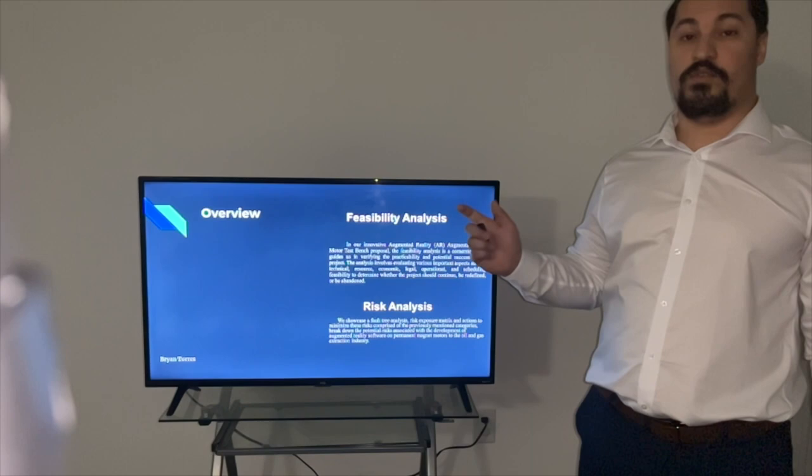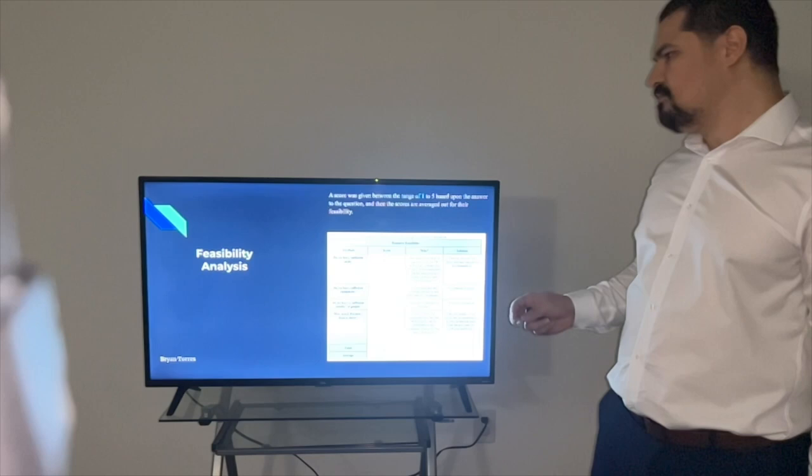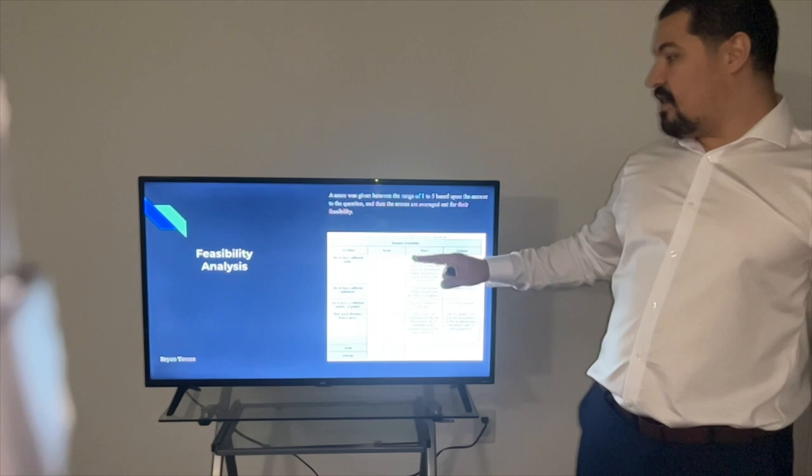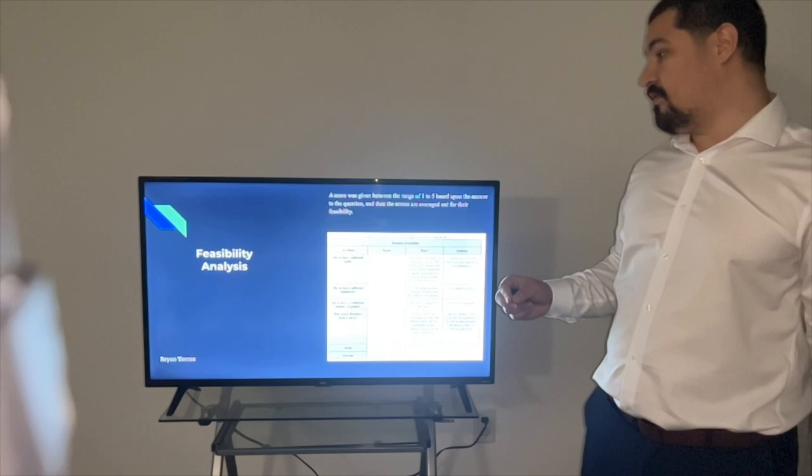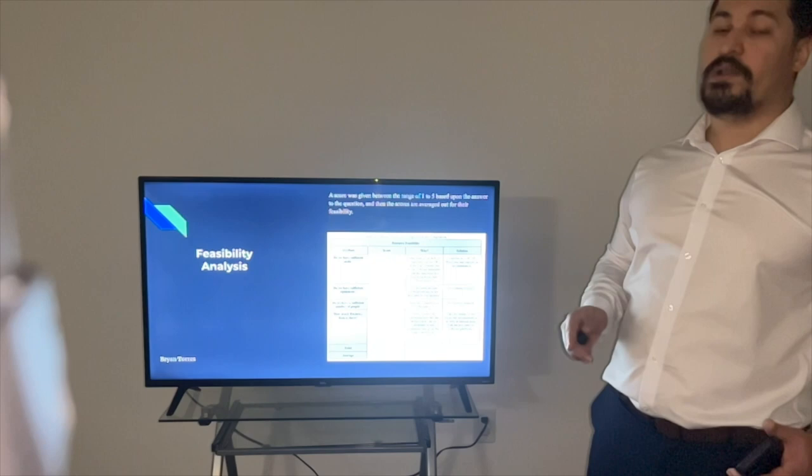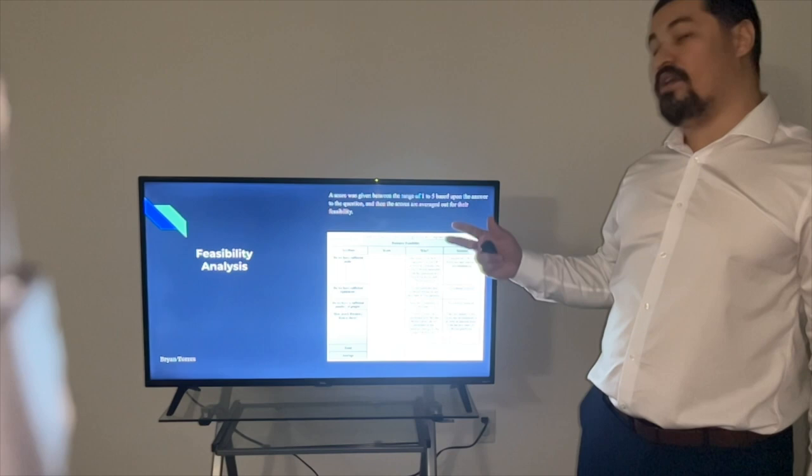On the feasibility analysis, each aspect has its own table. On the attribute side, we ask a question that we consider relevant and important for the accomplishment of our project. We have a score, one to five, one being the lowest, five being us being certain that we can overcome any harm, if there is any at all. On the why, we say why those events might be harmful and the solution to each one of them.